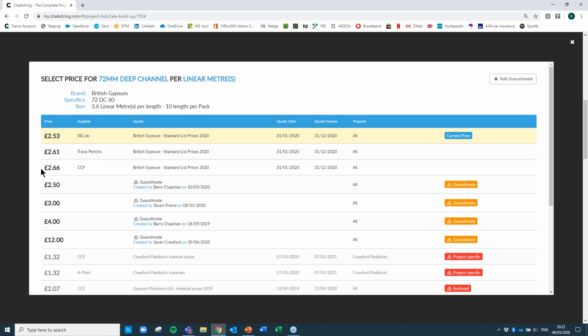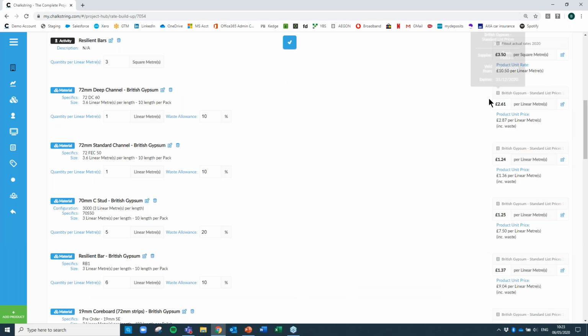But just to show you this, I have at my fingertips access to all my available pricing within Chalkstring. So simply clicking on that material, I can see, actually in this case, I have 3 available prices, SIG, Travis, or CCF, and I can pick up any of those I want to and apply those to the project simply by clicking on it. And that's then changed the price accordingly. But not just that, it's changed the supplier for the purchase orders. So what I'm trying to show is the amount of information at your fingertips.